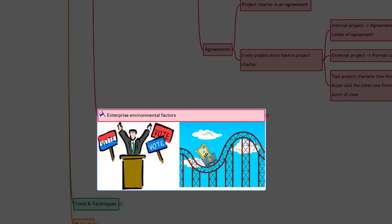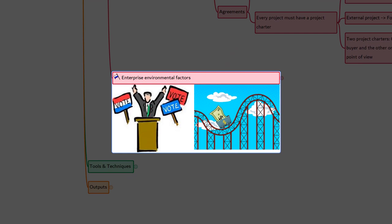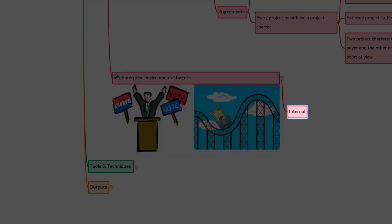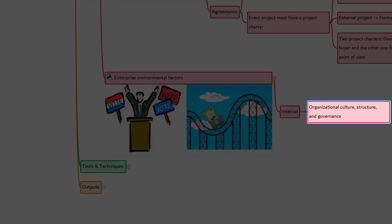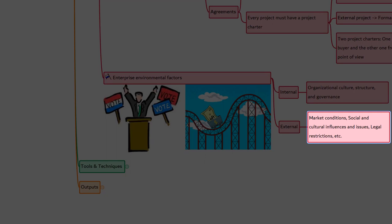The next one is enterprise environmental factors. There are two types: internal and external. Internal enterprise environmental factors such as the organization culture, structure, and governance will have influence on the project charter. For external factors, things like market conditions, social and cultural influences and issues, legal restrictions, commercial databases, academic research, government or industry standards, financial considerations, and physical environmental elements will have influence in developing the project charter.